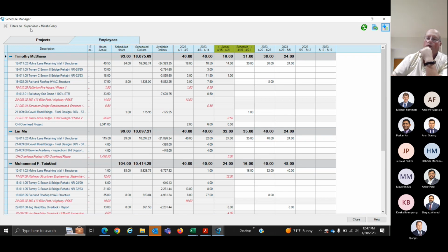So are we having an overload? If we are, do we have unused resources we can tap into? If not, can we put it at 42 hours a week for the next 5 weeks instead of 50 or 60 hours the final week? That gives you the ability to see in advance a little bit. And as long as you keep adjusting it as things come and go, fall online, fall offline, it becomes a very valuable tool.